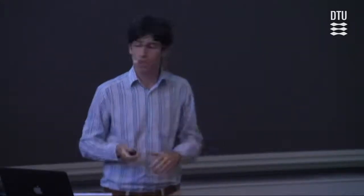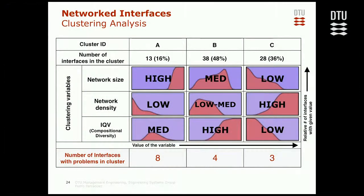The question is: so what? Does it affect something? To address that, we need to look at the number of problems per archetype. Cluster A: 13 interfaces, 8 with problems. Cluster B: 38 interfaces, 4 with problems. Cluster C: 28 interfaces, 3 with problems. Intuitively, we know there seems to be a very high proportion of problems in cluster A. I tested this with an ANOVA and it is statistically significant. So this constitution — relatively high size, low density, and medium diversity — seems to be correlated with problems. Perhaps interfaces that are very large and not cohesive are more difficult to manage and therefore more likely to have problems. This is not causal, just correlation, but it's something worth exploring.